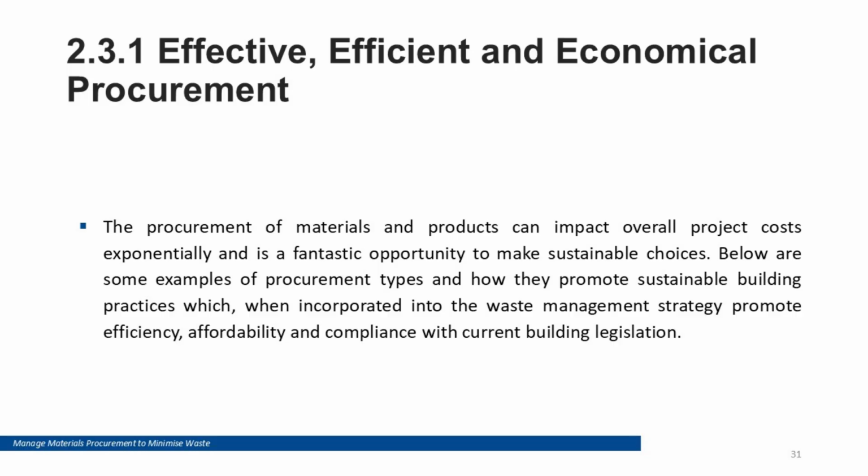Effective procurement reduces both cost and waste. It includes clear specifications, standardization where possible, and supplier agreements that support low-waste delivery. Procurement can also encourage prefabrication and modular components where suitable, which often reduces offcuts and packaging. Ensure ordering processes include checks for correct quantities, compatible products, and delivery timing. When procurement is planned well, fewer materials are wasted through surplus, damage, or incorrect supply.